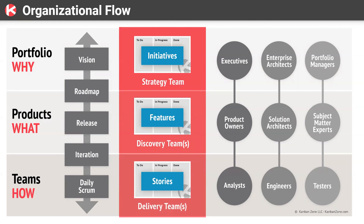At the third level, teams are focused on how to do the work. Teams collaboratively take a feature and break it into stories — this is where your engineers, analysts, and testers dig into the lowest-level detail to actually deliver work. There is full alignment and traceability in this model: the stories all connect back to a feature, the features all connect back to an initiative, which means everyone working in an organization like this has complete understanding of the context of the work and why they're doing it.